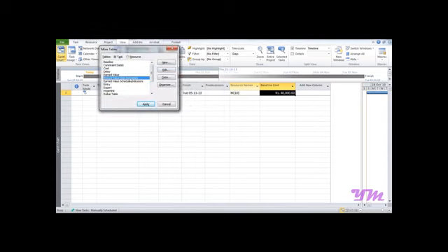Once done this much, go on to the view menu over here, and over here in the tables, go on to more tables and select earned value cost indicators and press apply. So after doing this, you can see we have got columns such as CPI, BCWS, BCWP. Now in order to work further, we need to go on to the add column and add a column named actual cost, and actual cost, as you all know, that is 11,000, so we'll enter 11000 over here.